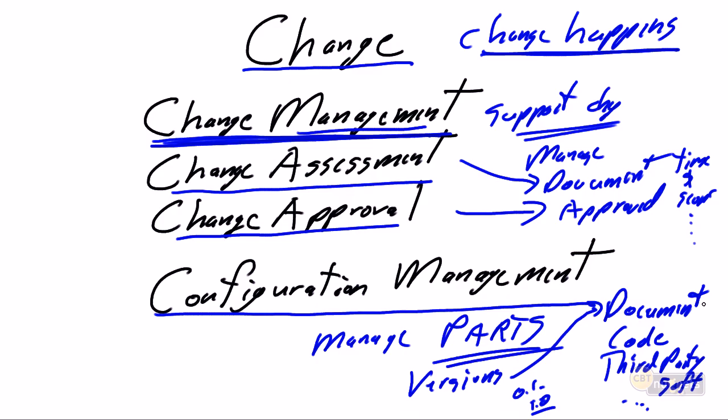Over the project, change is going to happen, and we may need to change our requirements document, and we're going to produce maybe a minor version, a 1.1, and we're going to present it for acceptance, or maybe it's a very significant change and it needs to go to a 2.0. So we need to have configuration management in place so that we can manage change to our documentation, so that we can manage versioning. The same applies to code.